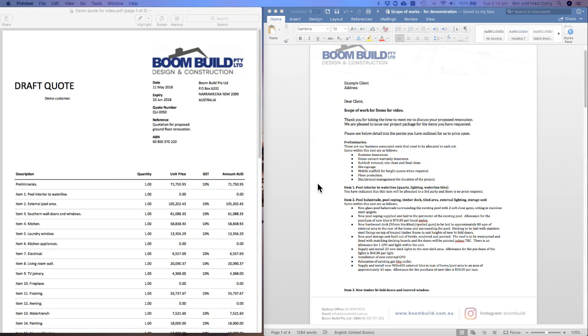And you need to realise that it is a building site and there are many trades and tools often going over a finished floor. And as much as you'd like to have people staying off a floor that's been freshly laid, the reality is at the end of a build, you have many trades coming in to finalise things, and it is so hard to keep people off certain areas. So my experience is completely protect the floor, minimise all risk. It does come at a cost, but it's cheaper than should there be any issues down the track.